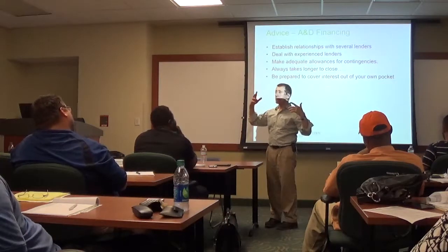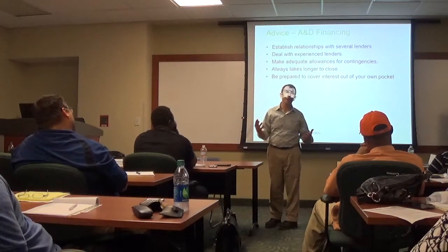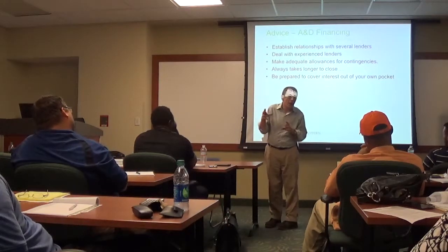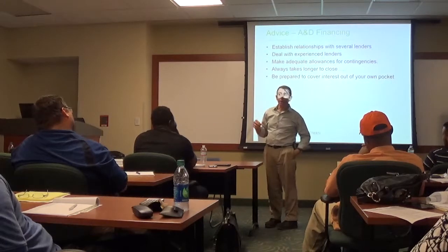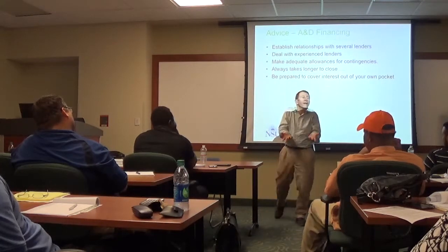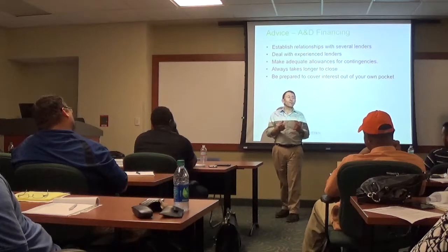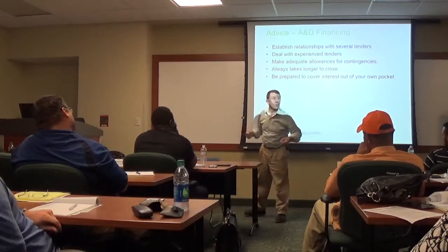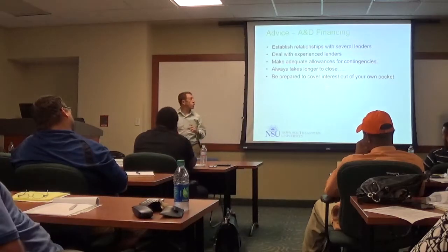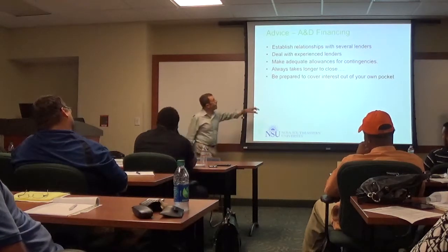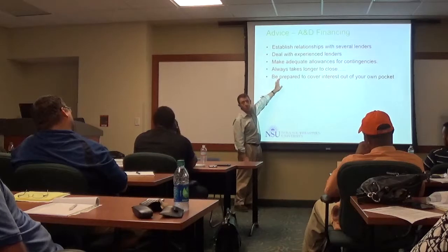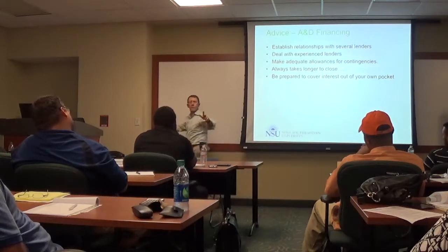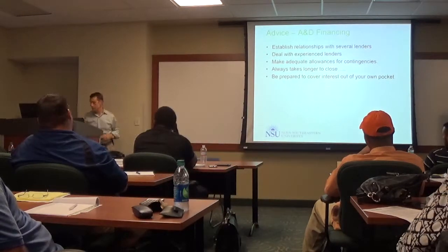Okay. And so, yes, you generally don't get the project finance until you've got the deal figured out and in place, so you're spending money out of pocket, and then hopefully you can get paid back for some of those expenses. Not 100%, maybe 70% or 80%, depending on the loan to cost ratio. And that's why you've got to cover that and probably the interest too as well, though there are tricks of the trade, we call them interest reserve, to get you there.